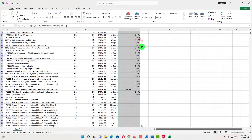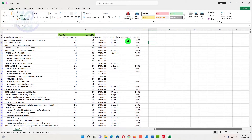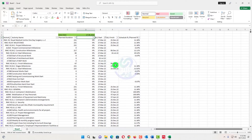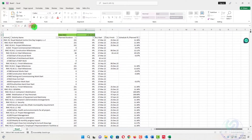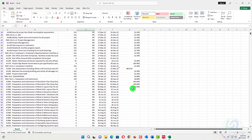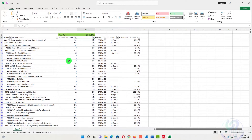We drag the formula down to all rows. When we change the data date to the next month — 27/4/2022 — the values update. You can see 11.36% and all values change accordingly. For the fifth month you will see 22.36%, and tasks that are complete will show 100%. This is how schedule percent complete works in the Excel sheet.